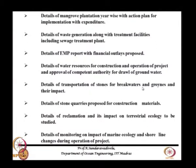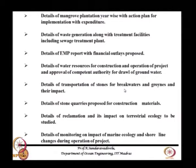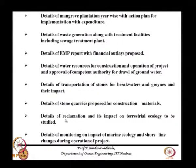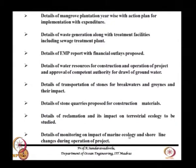Transportation of stones for breakwaters and groins and their impact is another important aspect. The quarry may be 30, 60, or 100 kilometers away. If you transport stones by trucks, the road will deteriorate and there are associated problems of traffic, pollution, and other aspects. Quarries have a license specifying how much material can be removed. Details of reclamation — when you dredge, you reclaim on land — and its impact on terrestrial ecology must be studied. The impact on marine ecology and shoreline changes during project operation must also be measured and reported.